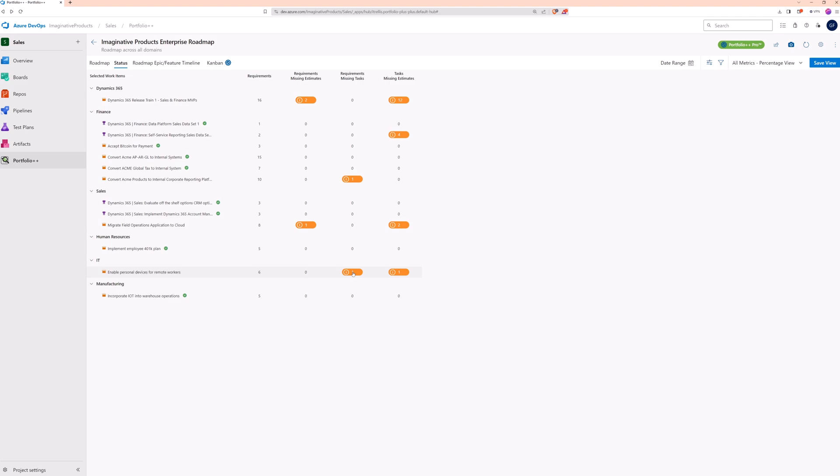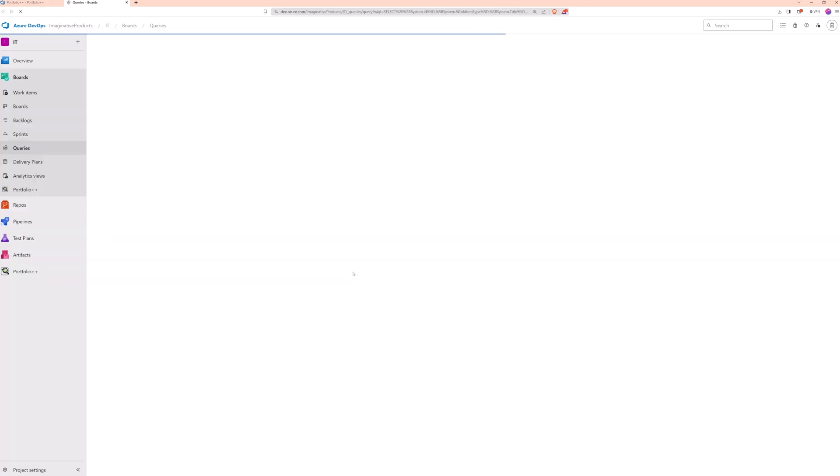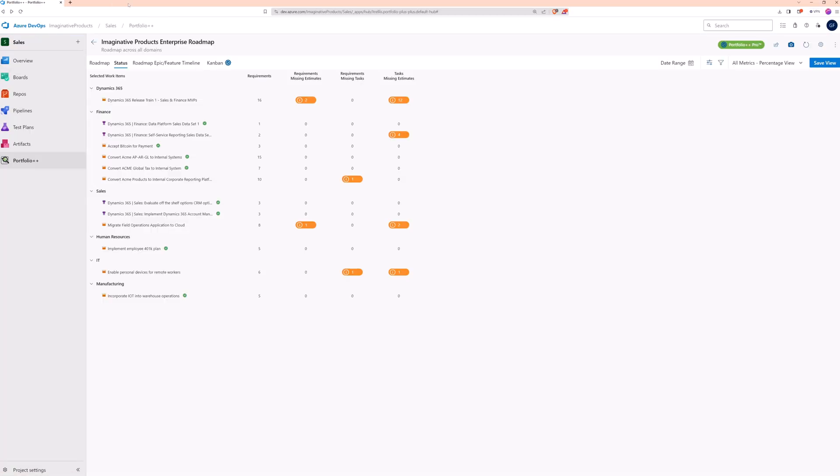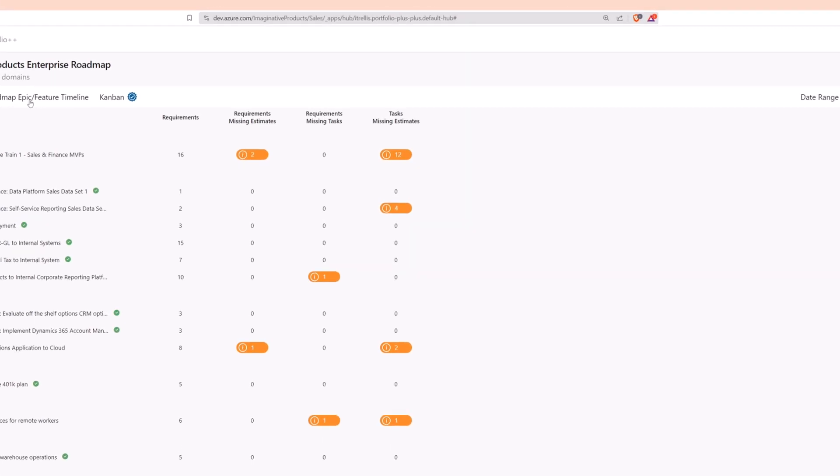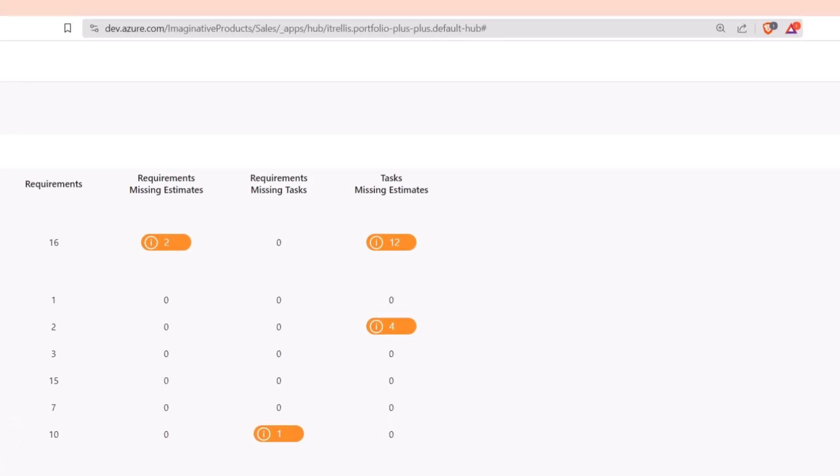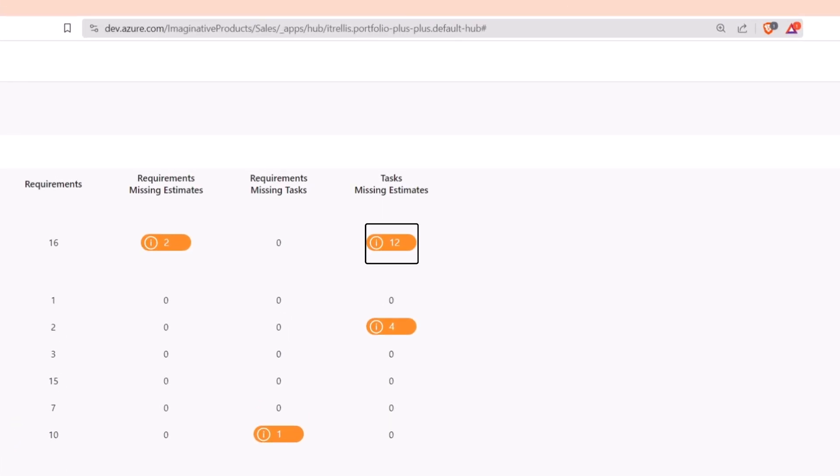For example, clicking on this metric shows the user stories that are missing tasks. These metrics can be used as a gauge of backlog completeness. Large numbers of undefined items could be an indication of areas that need attention.